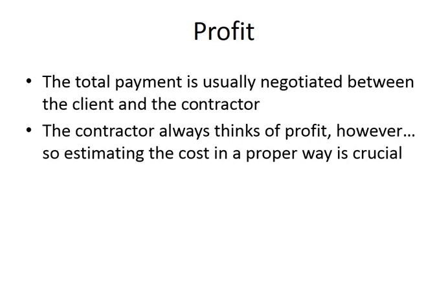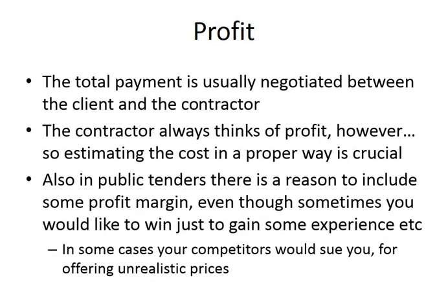What you think about is your profit, but to earn profit, first of all, you need to prepare the estimation of your own costs. First of all, then you add your profit margin on that. So this is the way you do it. This is another argument to show that, well, calculating your cost is crucial. It is crucial.